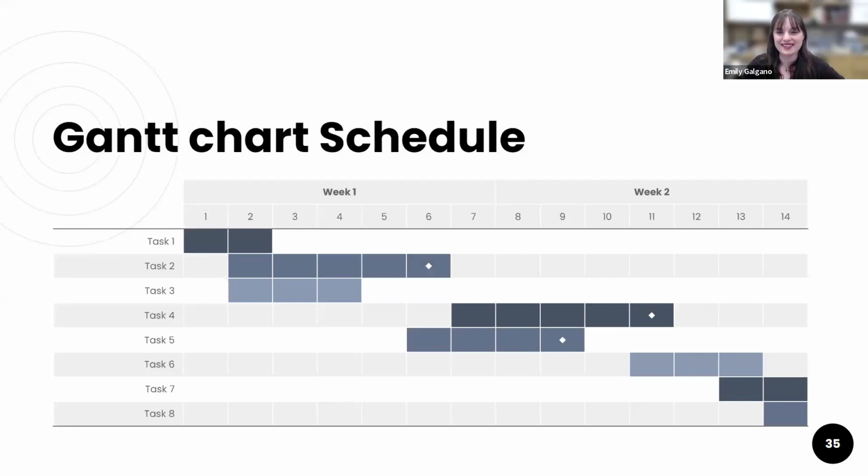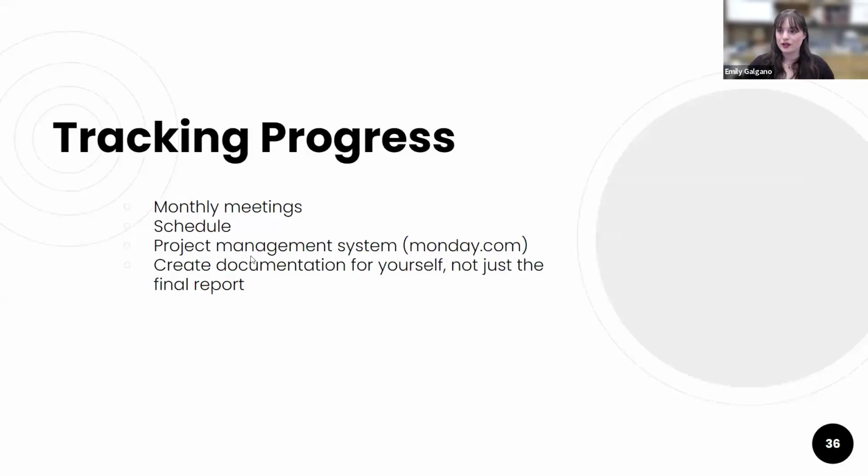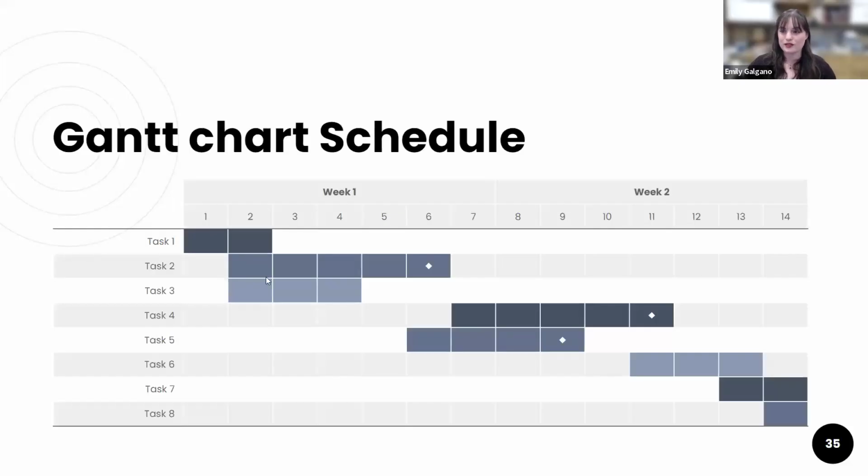I'll be quick. Emily. I just wanted to put up here a Gantt chart schedule. I find these to be really helpful when I'm budgeting out my time for a project, to make sure that I'm tracking that there's no other big events happening at the same time. We have a big event that happens every other year called Celebration, and from April to June, we are pretty much booked. So I don't want to have anything in those time frames to be doing for digitization work.